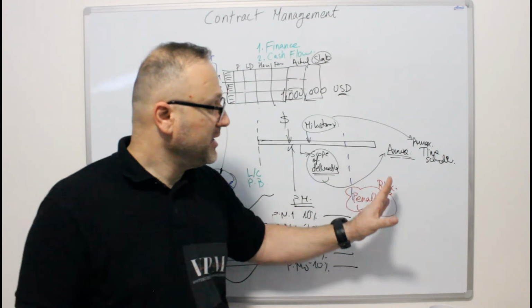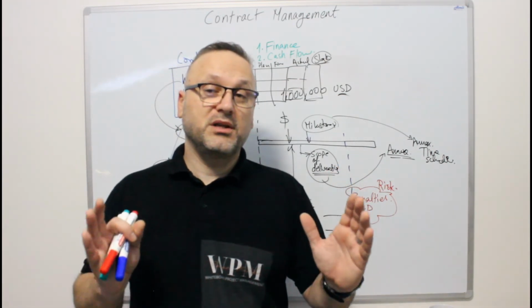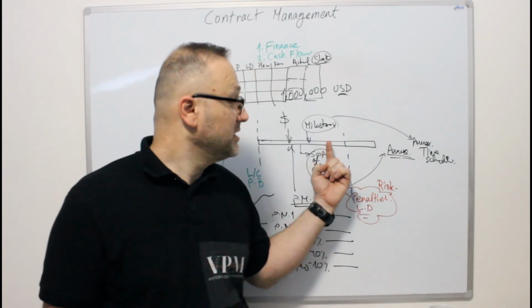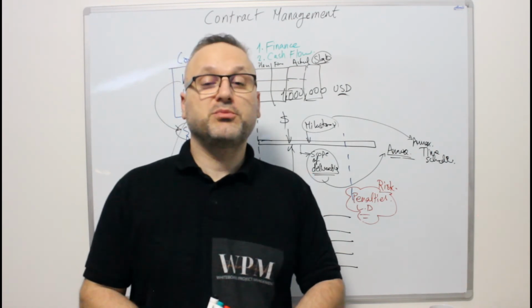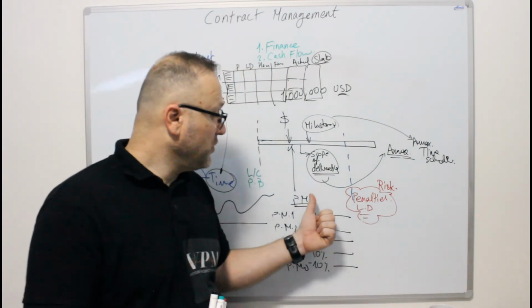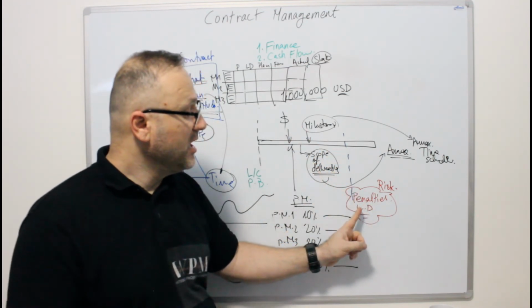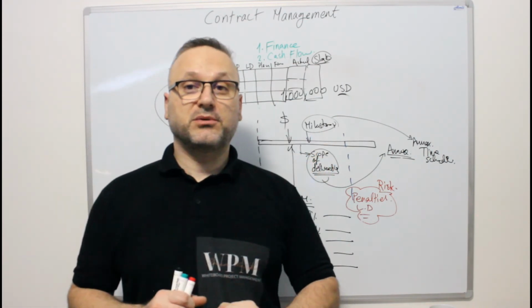Once you are preparing for the deliveries, make sure that all your deliveries and your communication are according to the signed contract. Your communication should always be in a written, official way for payment milestones, for official things related to liquidation damage, or for a key project milestone.